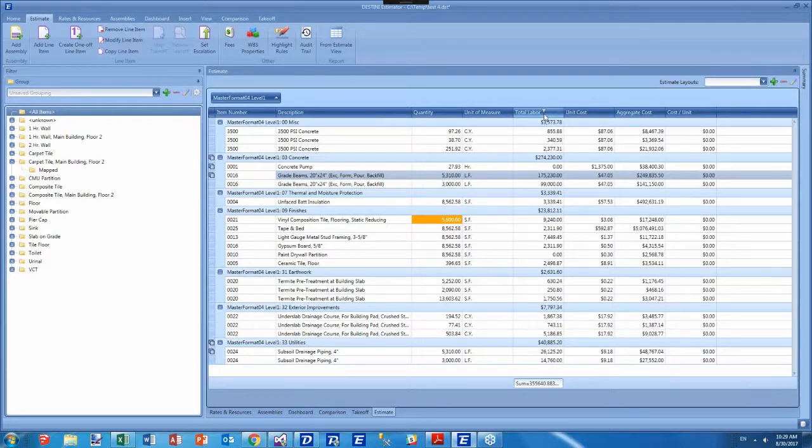Typically for our clients, if this is important to you, our implementation team likely created this for you. And what this is going to do is multiply the quantity of the line item times its labor price to give me the total price of labor for that line item. In the past, and you'll see it now done for me automatically, when I had this column, you could not create totals off of your grouping.